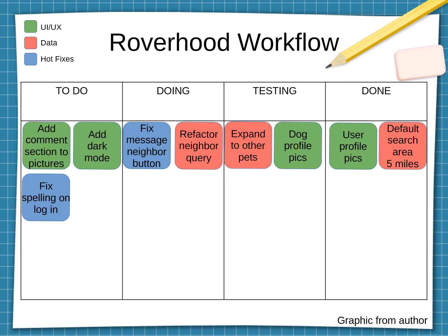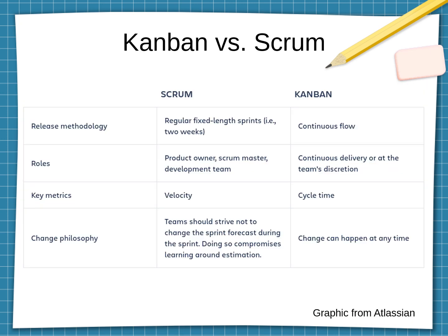So, now that you're a little more familiar with Kanban, we can think about it as an agile methodology compared to Scrum. We had mentioned before that Kanban is a continuous workflow as opposed to the fixed length sprints that exist with Scrum, where you promise a certain set of deliverables and no matter what, you keep your deliverable date. You do not push it back, but you may have to drop features to accomplish this.